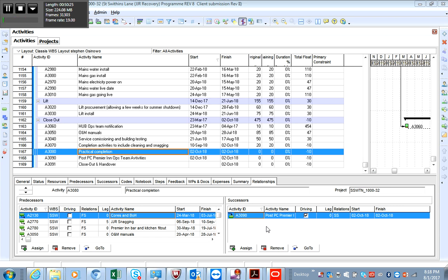So you've already shown the quality requirements. You've incorporated quality into the program by inputting activities as required by the NEC3 contract clause 31.2. Now, as the technical planner, you've looked at the total float values equals 0 for these two activities. Terminal float is 0. Contractor is late.